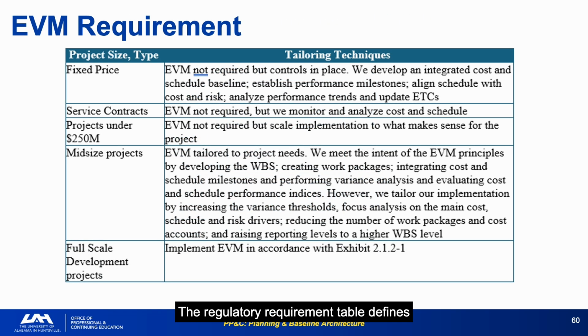The regulatory requirement table defines exactly which programs must implement EVM and to what standard. The $20 million threshold for Phase C/D programs is the baseline, with higher thresholds triggering validated EVMS requirements. Even if EVM is not contractually required, you still need some mechanism to determine performance, a tailored performance measurement system that serves the same function. There's no acceptable substitute for measuring whether you're doing what you planned.